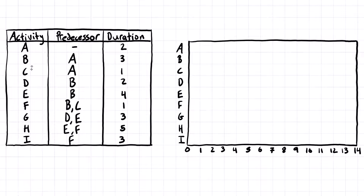So in the table of dependencies, we have the activities, each of the activities' predecessor relationships, and the duration of each individual activity. What we're not given is the overall project duration and the day that each of these activities start and finish on, which we'll be able to determine from the Gantt chart. If you're doing it by hand, using graph paper is a pretty good idea, or at least setting up a coordinate axis that has the days going across the bottom and the activities on the left side, preferably in the same order that you've been given in the table of dependencies.